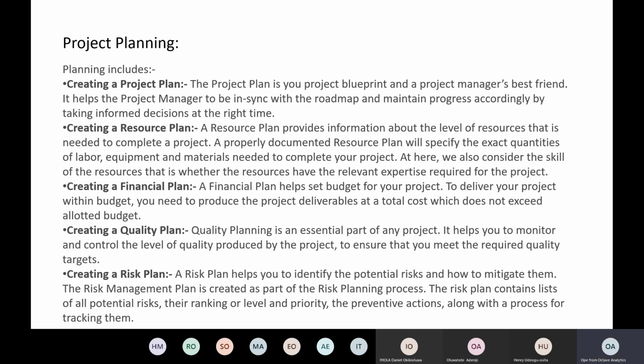As a project manager, you should have a high level understanding of the cost on the project, right? And the cost on your resource. So let's say your client is paying an X amount for the vendor doing the analytics project for them on a quarterly basis. Quarterly basis is 3 months. So within that 3 months, staff salaries are being paid. Within that 3 months, other staff costs are being incurred, probably things like transportation, additional costs, or other costs that might involve staff or other forms of resource, probably license cost that is attributed to vendor, not to client, might be incurred.